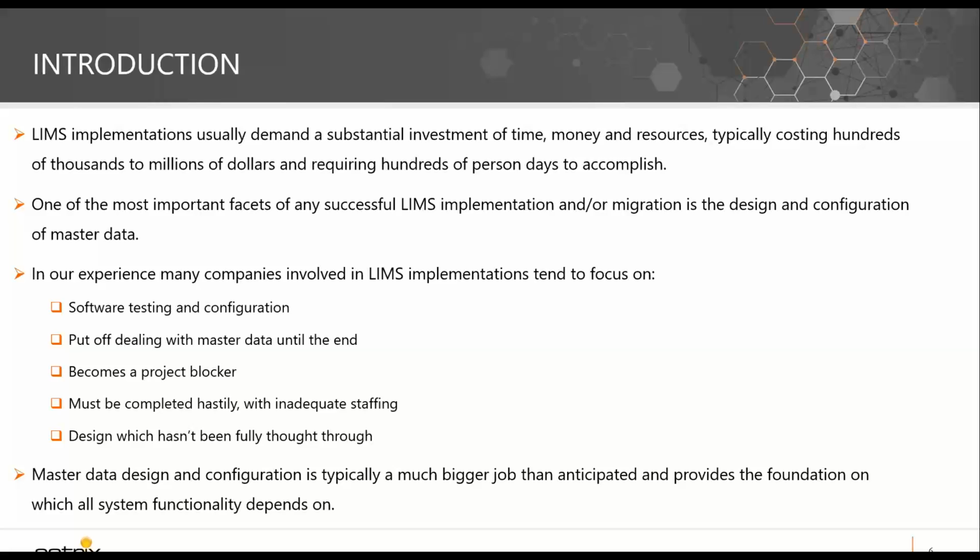And one of the most important facets of any LIMS implementation or migration is the design and configuration of master data. Very often, what companies do is they will focus on testing and configuration and leave master data until the end. It can very often become a project blocker or at a minimum a critical path. Then it gets done quickly and with sometimes not the appropriate resources, as well as designs which haven't been thought all the way through. And master data design configuration is typically a much bigger job than we think it is when we're going into the design or development phase of a project. Next slide, please.